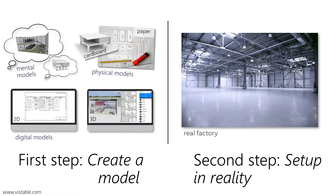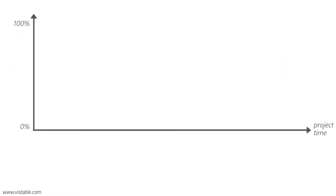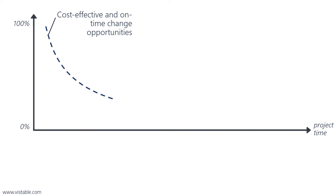The better and more accurate the model is created or planned, the better the implementation will work in reality. There is a simple correlation behind this: cost-effective and on-time change opportunities decrease over the project duration. Changes to a model are much easier to implement than changes to the real factory.